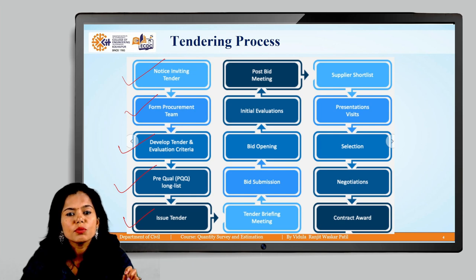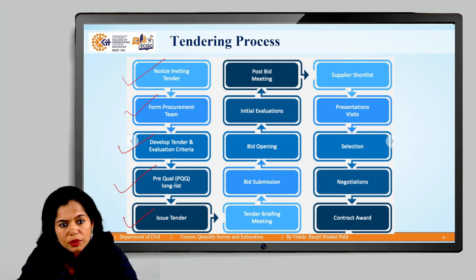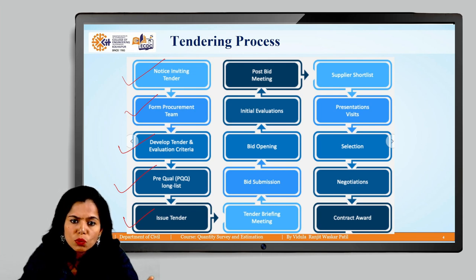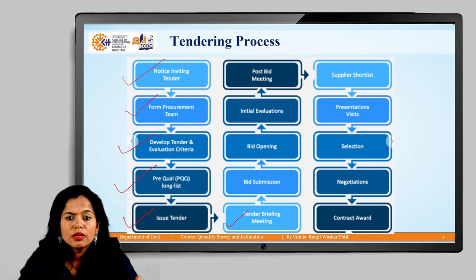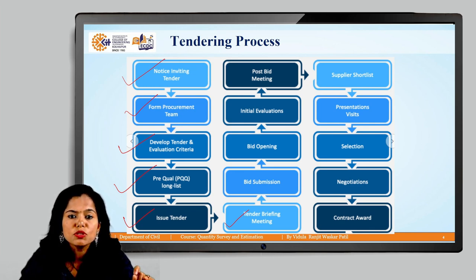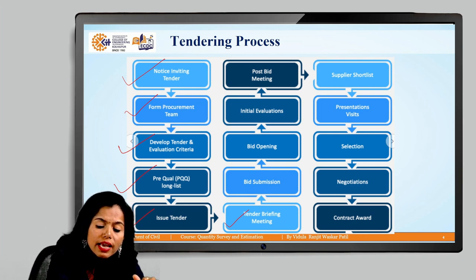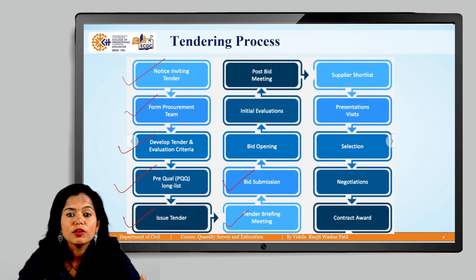After receiving the tender document, contractors evaluate it thoroughly. Sometimes they have queries or don't understand some conditions. For this purpose, a pre-bid meeting, also called a tender briefing meeting, is held before submission of the bid. Contractors can ask questions at this pre-bid meeting.